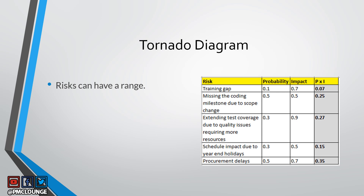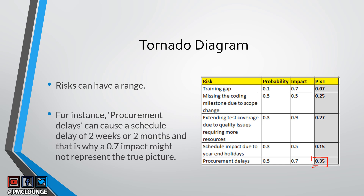The fact is, risks need not always have absolute values — risks can actually have a range. While procurement delay shows a P times I value of 0.35, there is a possibility that it could cause a delay of two weeks or it could cause a delay of two months. So this impact of 0.7 is actually an incomplete picture, because the true picture could be a range — from two weeks to two months. This is where you enter the tornado diagram.